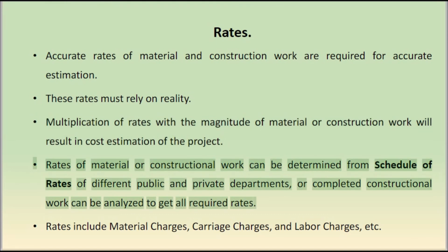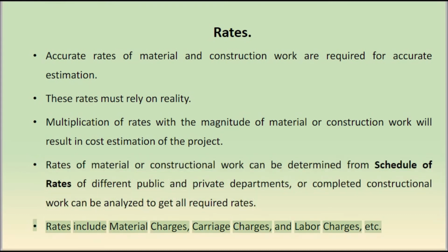Rates of material or constructional work can be determined from schedule of rates of different public and private departments, or completed constructional work can be analyzed to get all required rates. Rates include material charges, carriage charges, and labor charges, etc.